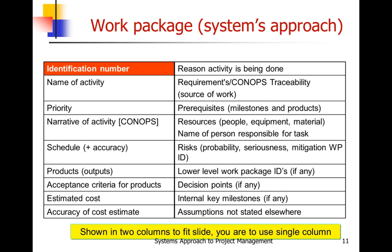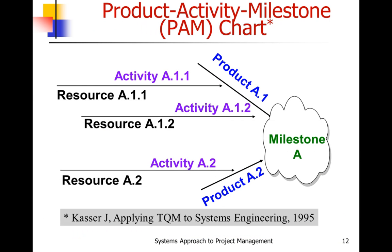A work package includes things like the reason the activity is being done, the resources needed, traceability, decision points, assumptions, and so on — all explained in session 4. Another planning tool is the product activity milestone (PAM) chart, introduced in 1995 in my book 'Applying Total Quality Management to Systems Engineering.' For those with a background in TQM, you can see that it's essentially a cause-and-effect chart in reverse.